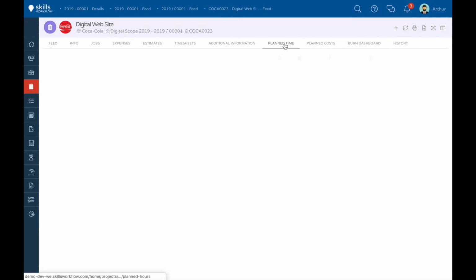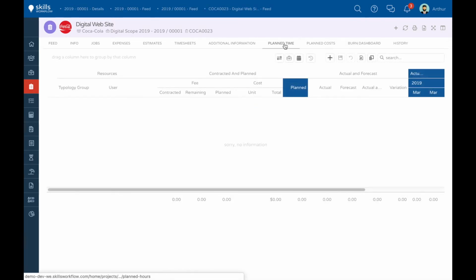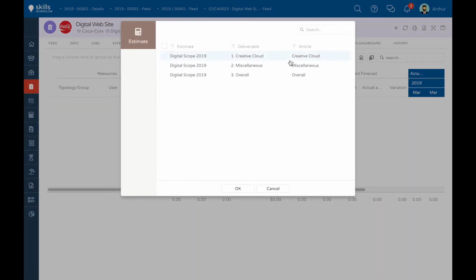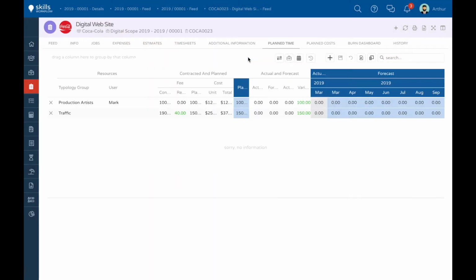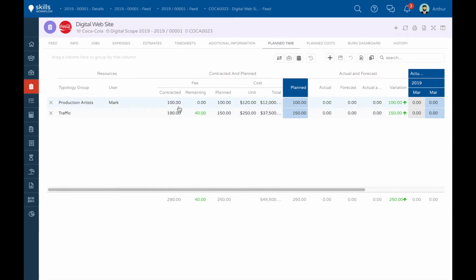Okay, let's start planning the hours and allocating resources to my project. First, I need to select the option Get Contracted Hours and link to the correct deliverable. I can see that I have 100 hours contracted for Mark, which is a producer-artist, and 190 hours for Traffic. I see that the system is suggesting that the planned hours match the contracted, which in this case is right, so no need for changes.